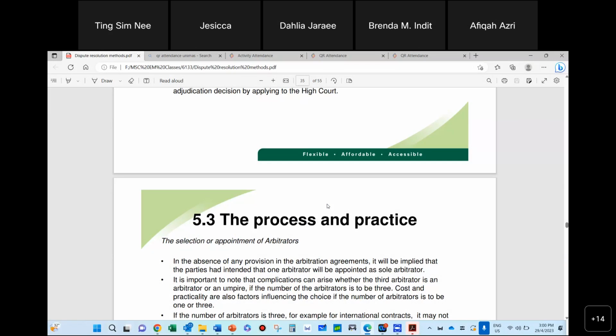I think we all need a good bunch of people to be there to help resolve construction disputes, not only with money matters. You may ask me, why do money matters sound so simple? Why do you need adjudicators? When there's non-payment, a lot of times it's actually dealing with a lot. Behind non-payment, there may be cases like quality, non-compliance, schedule delays, LAD, very technical problems and issues with the material, with the work itself, with the final products especially, or with the service itself.